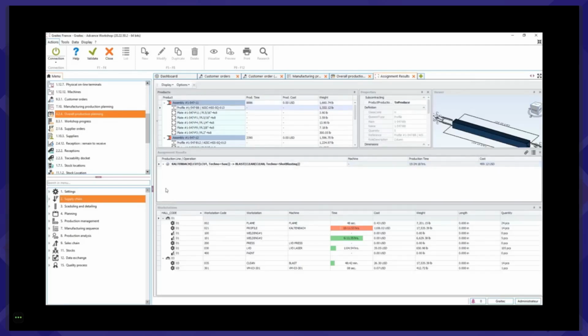If I wanted to subcontract a specific operation, now, of course, in our import menu, you could choose to subcontract at that level. However, if you've imported it and suggested that everything's going to be produced in-house, but then after you realize that your shop has hit critical mass and it's a rush project and you have no choice but to subcontract later, you can always choose to subcontract the entirety of the assembly if you wanted to at this level. If it's just a component, you could subcontract the components. Or you could subcontract the individual operations.